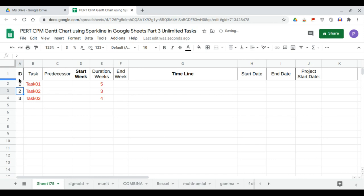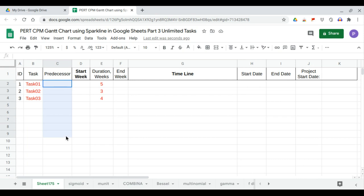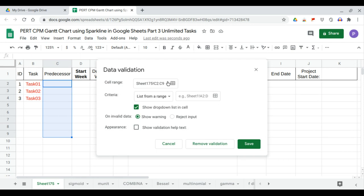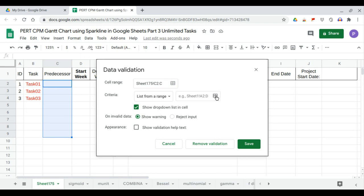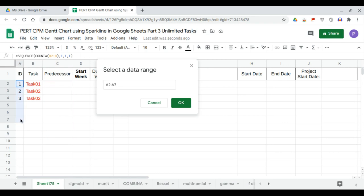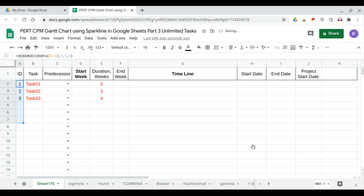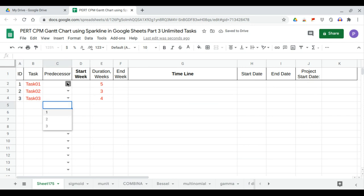These are task IDs. Next is the predecessor column, which is a selector column. We apply data validation starting from C2 to C, using a range from A2 up to A. Hit OK and save. Now the entire predecessor column is filled with a selector.